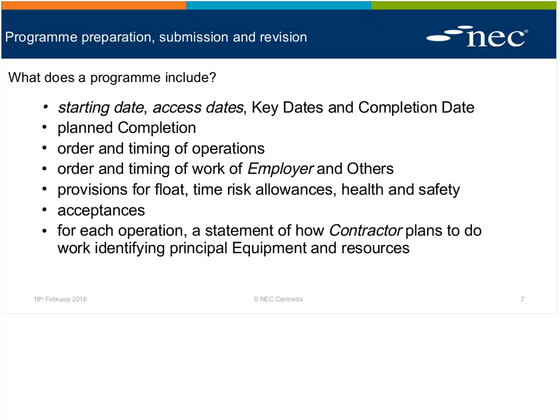When it comes to doing compensation events or other interrogations of its realism, you can't do the productivity bit, which you need for compensation assessment, unless you've got both time and resource. So time and resource gives you productivity. If you've only got one half of that, you can't calculate the other. So resourcing is absolutely essential.